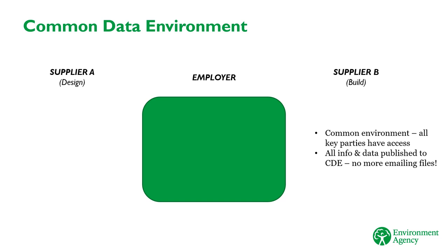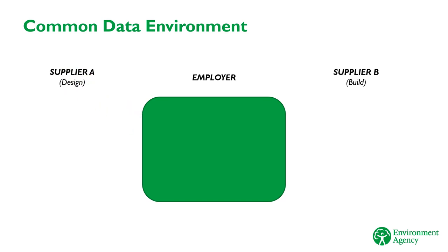So it's called an employer CDE. This environment is linked to the IDP. So it has a structure which dictates how things are referenced in the workspace. It also has a process for validating files which makes sure that people only ever work from the most recent information. So, for example, when supplier A wants to share a document with the rest of the team, they simply add it to the CDE with a BIM-compliant file name.